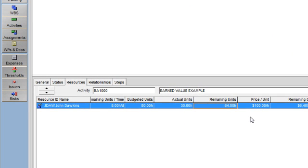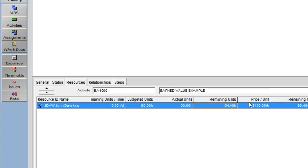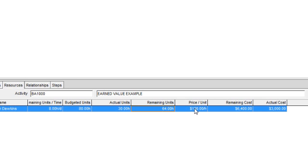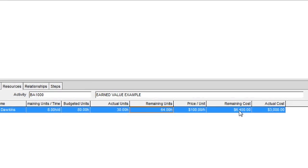And the remaining cost of this activity is taken from the Resources tab where I can see I have 64 remaining hours to be spent times the $100 per hour rate of the resource to arrive at $6,400.